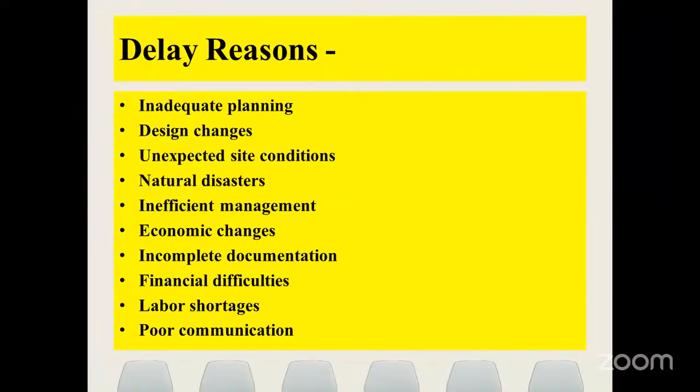Okay, this thing we faced during one of our projects. Actually, we were not able to gather all the NOCs, no objection certificates, from the authority, and they stopped our work due to not having necessary permits. So to get those permits, we spent again 2 months. After 2 months, we received the NOC, and after the NOC, we started our work. So in between, we lost many things.